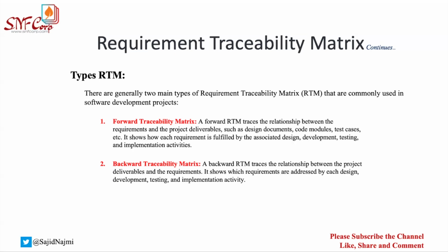This is for you. And what is the life cycle of this RTM? The moment you start the project, it starts. And the moment you get the sign-off from the business after deployment or delivery of the project, this is done. You don't need this RTM. But as I said, this can be used anytime in future as well. Any other project team members going ahead, looking at your project details and would like to see what was the reference, at that point in time, that person might need your RTM to understand.